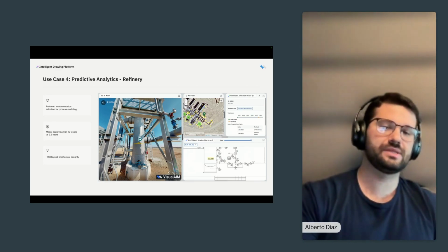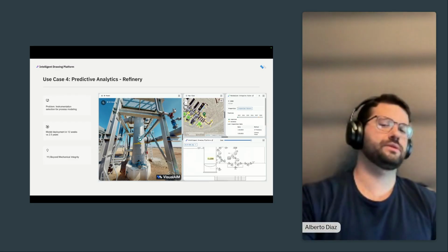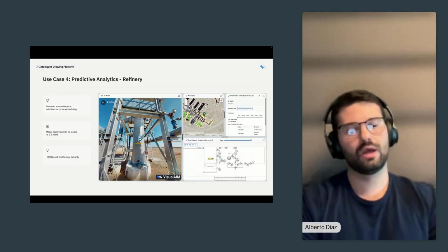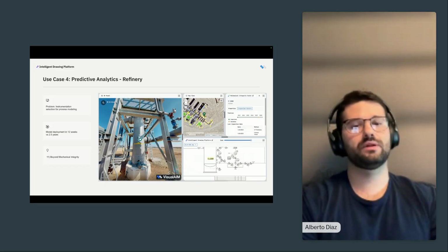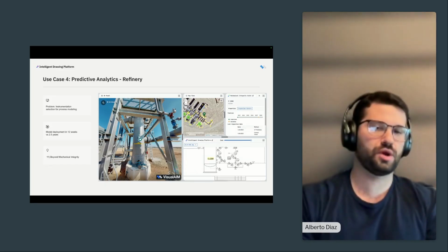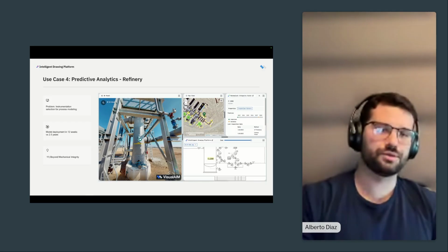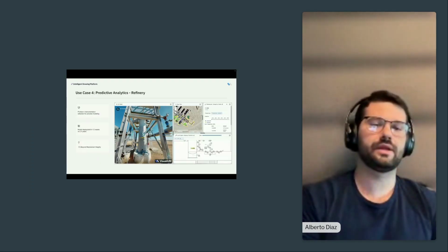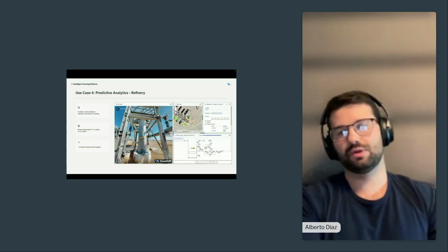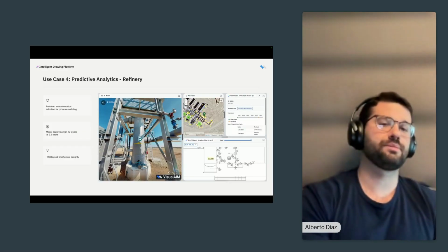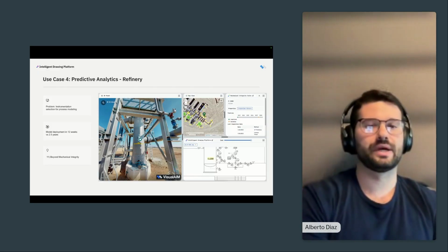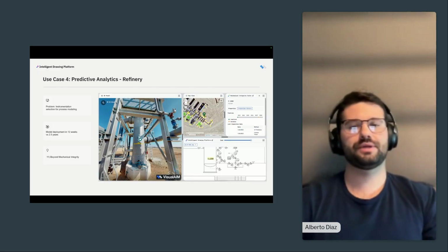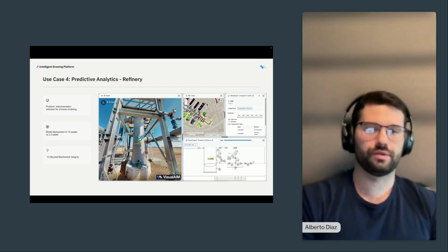When you're able to access these plant views along with technical documents like P&IDs within the tool, you're able to do all of this work planning remotely and ahead of time, saving a lot of costs as part of this process. Because the tool does allow you to do, for example, measurements to understand how much scaffolding you're going to need in a particular area to either repair an asset or address any particular integrity issue that you might have on site. So this is one of those examples of taking it beyond mechanical integrity as far as what else can be done with the tool.